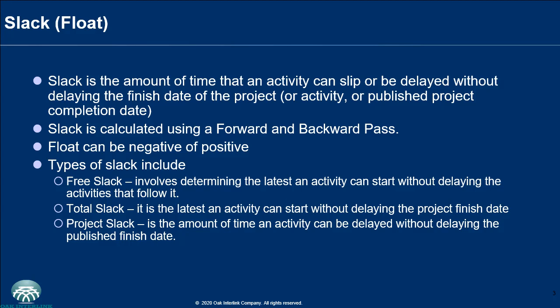So that already suggests to you that there could be a difference between the project finish date and the published finish date. Typically, the project manager and his team can decide to have a different date to finish the project that is published, that is made known to other parties outside of the team. While they may be working with a slimmer schedule, they may have given the other stakeholders outside of the team a schedule that has some buffer, okay, to allow them some leeway as per when to complete the project.